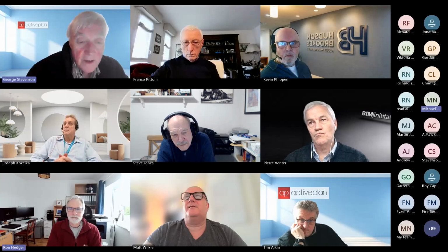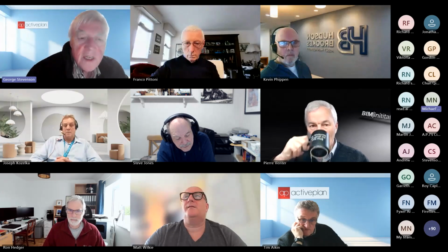Ron, if I could just question that. You're absolutely the expert, that's why I've asked you to be here. But I'm questioning what you've just said, because Regulation 38 isn't only about receiving information. It's also the duty of care of the responsible person that's having work carried out to provide the contractor with the information that they need to ensure that the work's going to be safe. Am I wrong about that?